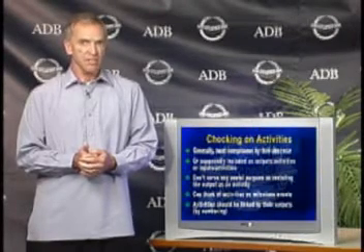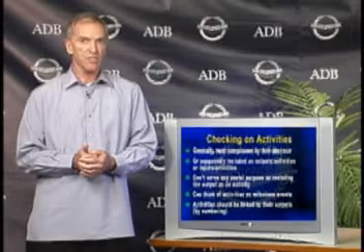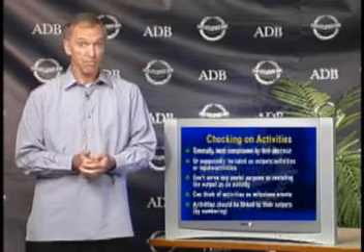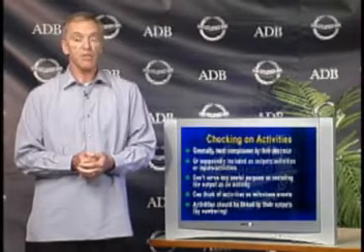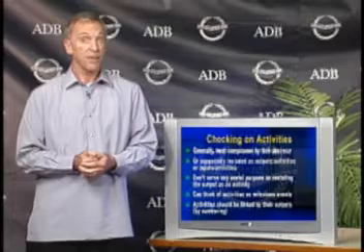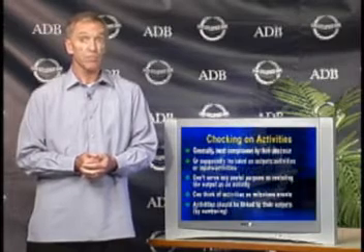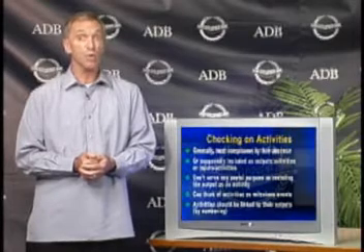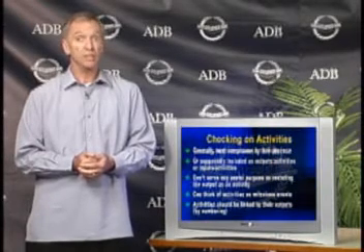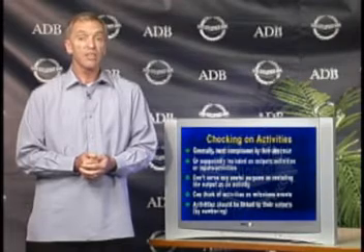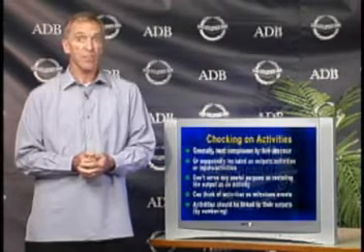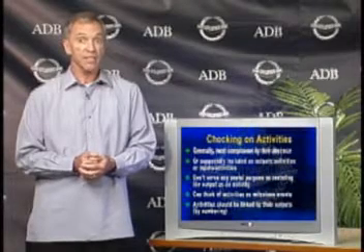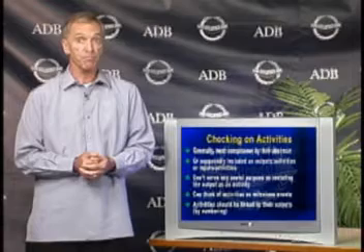The key activities should be the milestone events that will enable us to track the project's progress. Many of ADB's projects are extended. In fact, over the last 5 years, more than 80%. And more than 60% have had to be extended 2 or more times. This shows us that we do not have realistic implementation schedules for our projects, or that we are not tracking emerging problems effectively in order to take corrective action.